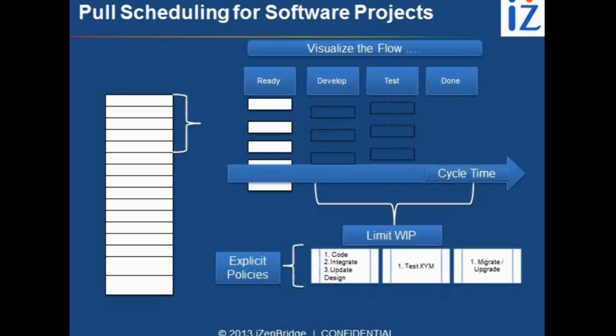So we show that these many items are lying at each particular stage, and a work item moves from one stage to another before it gets completed. And for each stage, we have a defined completion criteria. You can visualize it like if you go for a car service, your car goes through multiple phases or multiple stages before it is ready for you to take. All these stages can be visualized as workflows, and nobody allocates them when you submit your car or give your car for service. They get allocated as per the capacity available in various processes or various departments.